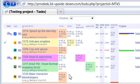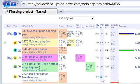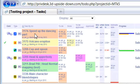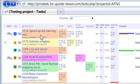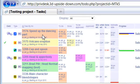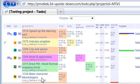You can also see that artist estimates are zero hours and there's no completion date. The next stage is the orange which is to do. These are the tasks on which the estimates have been accepted. So only once you see that your task is in orange you can start working on it. If your task is white you shouldn't work on it yet.